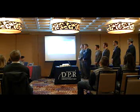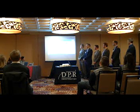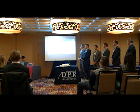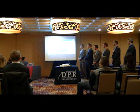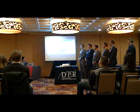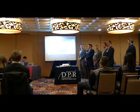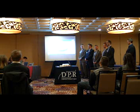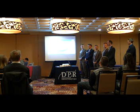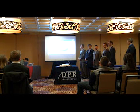So now we'll get into the numbers. The total job we estimate to cost about $36.3 million. The majority of that is going to be the actual construction costs of the job. The contingency is about 4%, with design contingency being 2%, construction contingency being another 2%. This is going back to that contract A language where contingency can be utilized without prior owner approval. This is good. It keeps the schedule and allows us to use the contingency as we see fit.